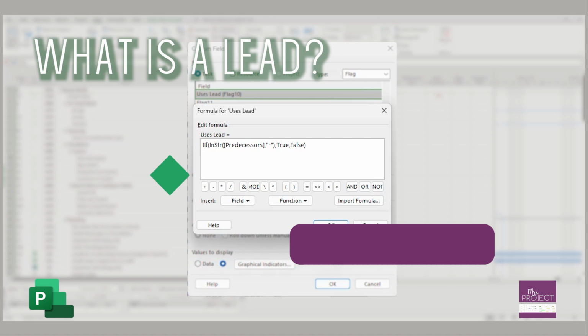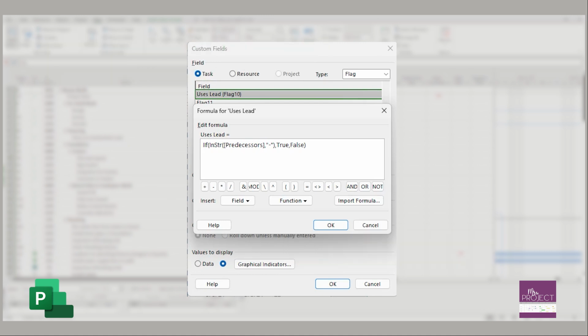There's some instances where there's like a test and they say, okay, 30 days before this test, we have to have this review. There's really no other predecessor to it. It's just how the test community runs their review sometimes, is it says so many days out, we have this. So that would be when you use a negative lag or a lead.